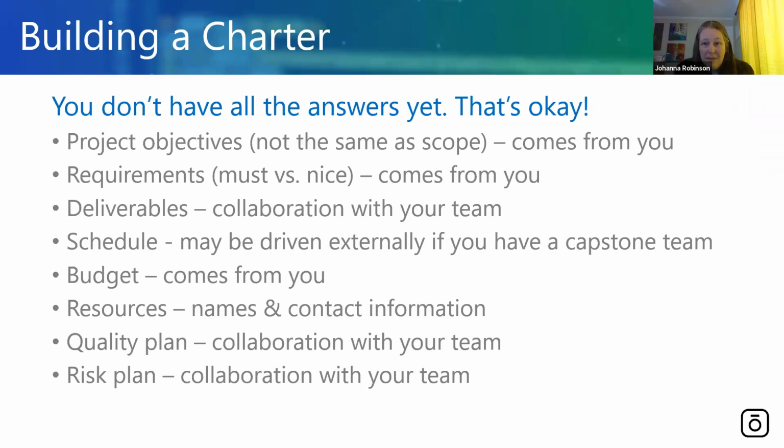Because you're building an MVP, you have a really small amount of time, and you're going to get feedback from your users, and it's probably not going to be right. So you don't want to spend a lot of effort putting polish and shine on it, especially in this first iteration. So I always ask people, do you have to have it? Is it really, really, really required versus nice to have? Sometimes I see requirements that say, and optionally this. I'm like, that doesn't go in that list. If it's optional, it doesn't go in the list.